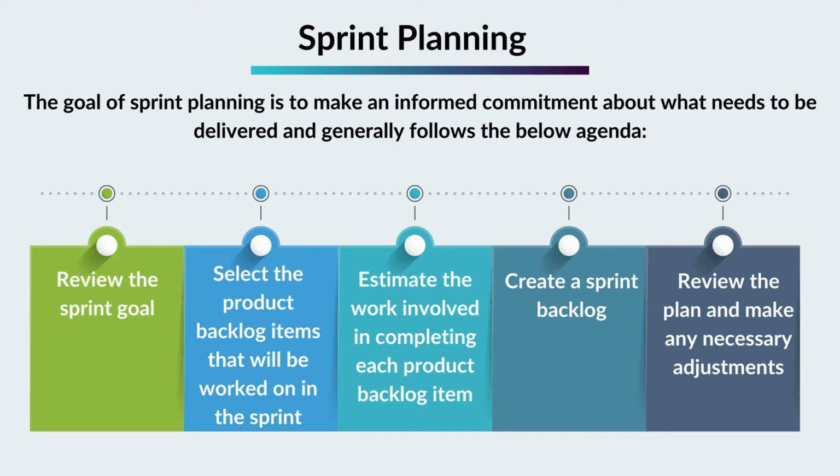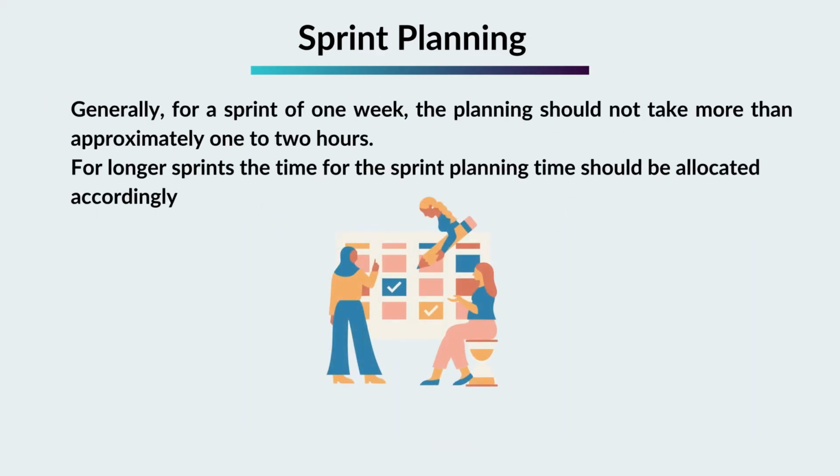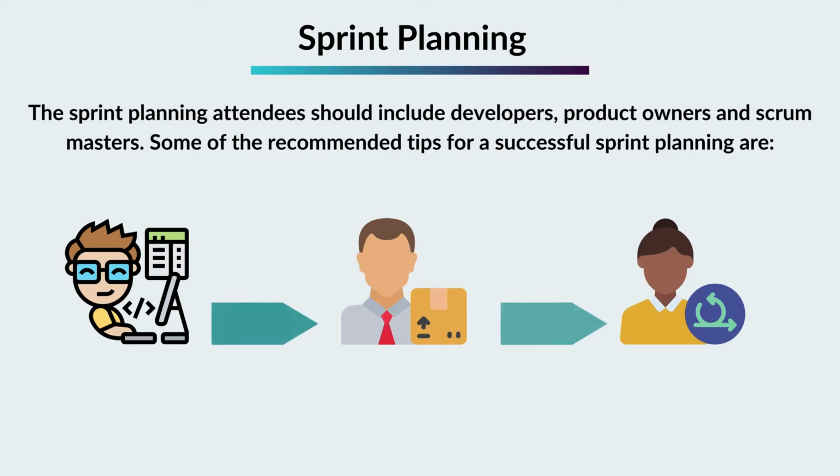Generally, for a sprint of 1 week, the planning should not take more than approximately 1 to 2 hours. For longer sprints, the time for the sprint planning should be allocated accordingly. The sprint planning attendees should include developers, product owners, and Scrum Masters.